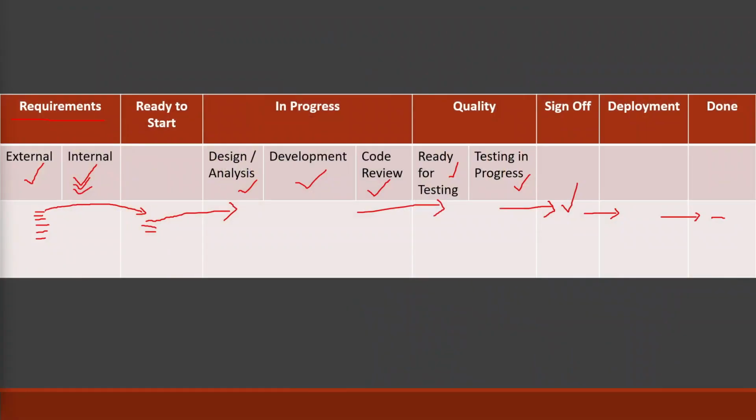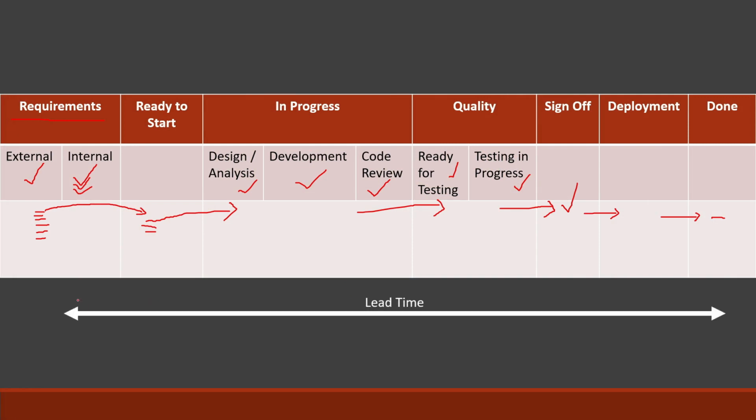So now, what is lead time and what is cycle time? Back to our original question. Lead time is essentially the time the team takes from the point when the requirement came in the requirement column, right? A customer sent a requirement, a team nominated a requirement. It could be the support team, it could be the engineering team. So whenever the requirement came in your requirement column, from that day till the day you actually pushed it out of the door, this is lead time.